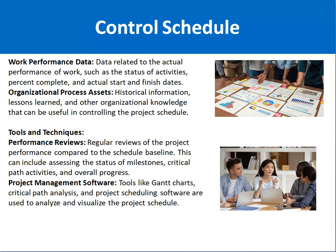The tools and techniques for the Control Schedule process start with Performance Reviews. Performance reviews mean reviewing the work in progress against the schedule baseline, assessing the status of milestones, critical path activities, and overall progress. For example, if software development was supposed to be completed by January but in mid-January you notice it is not going as planned, you must raise a red flag and take corrective action.